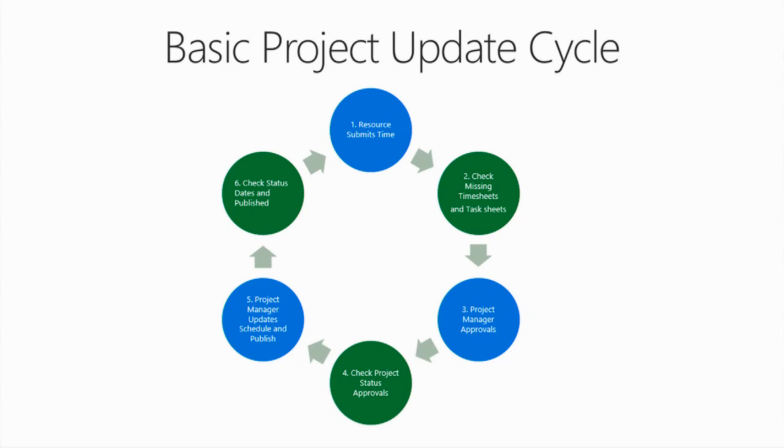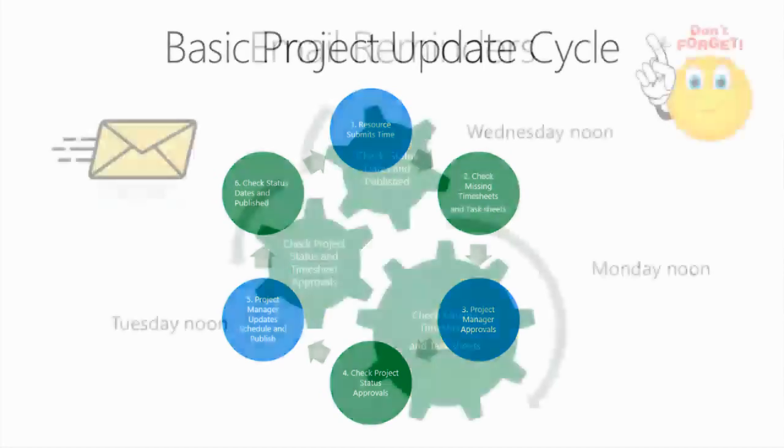Resource managers and project managers get their timesheets approved by Tuesday morning. The governance has to define when things happen and have a time and date: Mondays at 10, Tuesdays at 8. If you miss it, you miss it. But you want everybody marching to that same beat of these cycles.